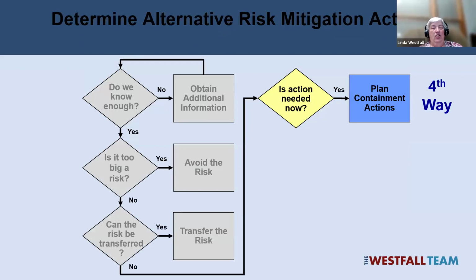Of course, the one we do probably most often is put containment plans in place. We actively attack that probability or the loss. Again, we can put a containment plan in place to make the board wider. We can put a railing on the board. We can do training and have you practice down on the floor.